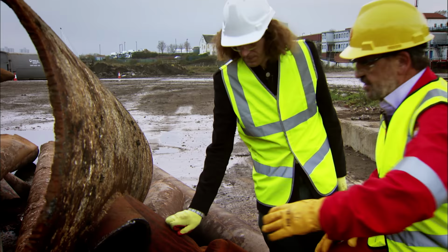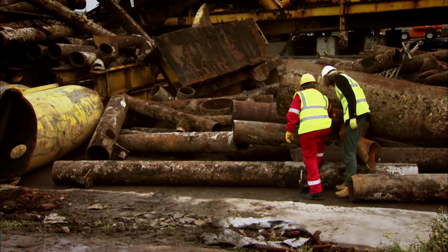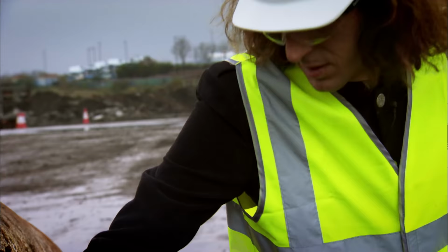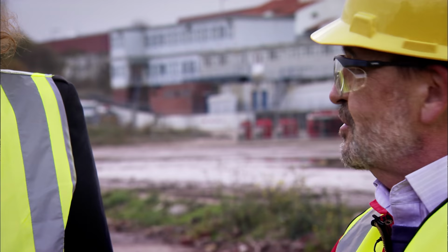Now, this is a very tough angle for a welder to get in at these points. You get right down in there. Exactly. So in an ideal world, that brace would have been at less of an angle. But very often the designers just wanted it to be structurally robust. And then when it arrived for us to deal with it in the construction yard, you think, wow, why did they do that? And so on paper, mathematically, it makes perfect sense. Exactly, but sometimes it wasn't constructible.